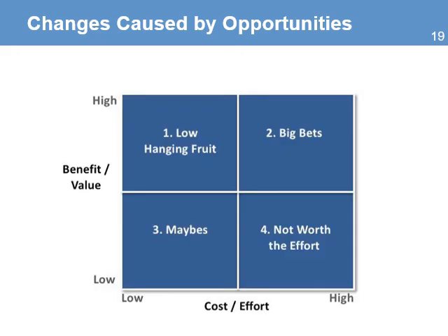Another tool to help make a decision amongst the many opportunities is the impact effort matrix. This is an analysis of the opportunities available to the project by the benefit they can provide and the cost or effort needed to implement. You should consider those opportunities that have high benefit but low cost, and disregard those opportunities that have high cost but low benefit.